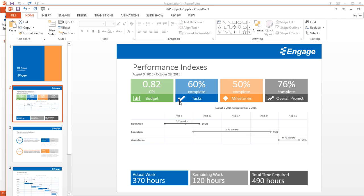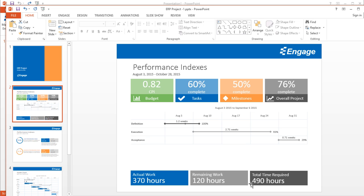Over here, I can say that we're 60% complete on all of our tasks, 50% complete on all our milestones, and 76% complete for the overall project. I also have a budget KPI over here. And then finally below, we've spent 370 hours of work so far, we have 120 hours remaining, for a total time required of 490 hours.